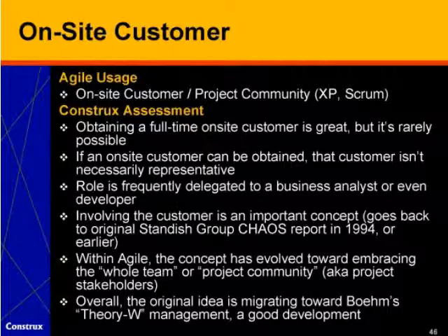Second is that even if you can get one person full-time, that person isn't necessarily representative of your customer base at large, and we've seen some organizations put a lot of weight in the input from that one person, only to find as they near the end of the project that that person isn't representative, with a great deal of rework resulting from that. So we think involving the customer in some way, shape, or form is a really important idea. It certainly goes back at least to the original Standish Group Chaos Report in 1994, when they identified customer involvement as one of the top success factors for projects. But I think involving customers more broadly is really the operative idea here.